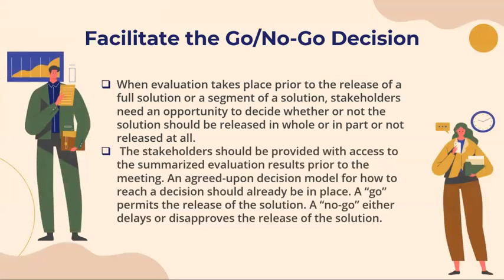Sometimes the evaluation results reveal overriding reasons to delay the release, and sometimes they reveal a stopper so it will not proceed at all. This enforces a no-go decision on management. Such a decision can occur in projects that present extreme risks for life or property or large-scale finances. In those cases, management makes no-go decisions.